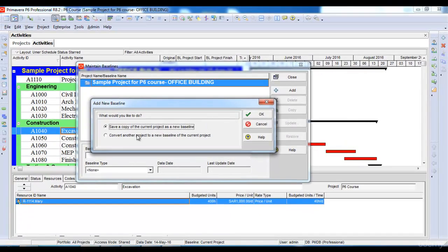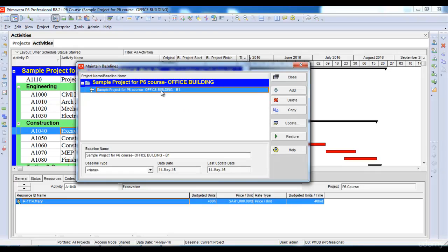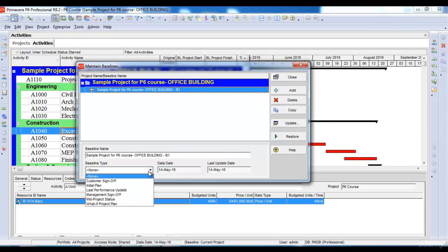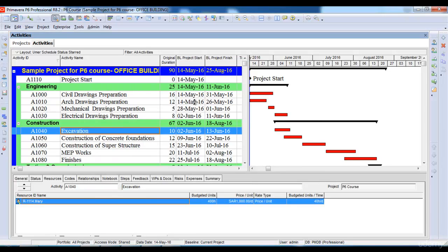Now my baseline has been added here. I can name this baseline and I can select the baseline type. Let's say I select the baseline type as Initial Plan and then click Close. Now I have maintained my baseline but I have not assigned it to my project yet.